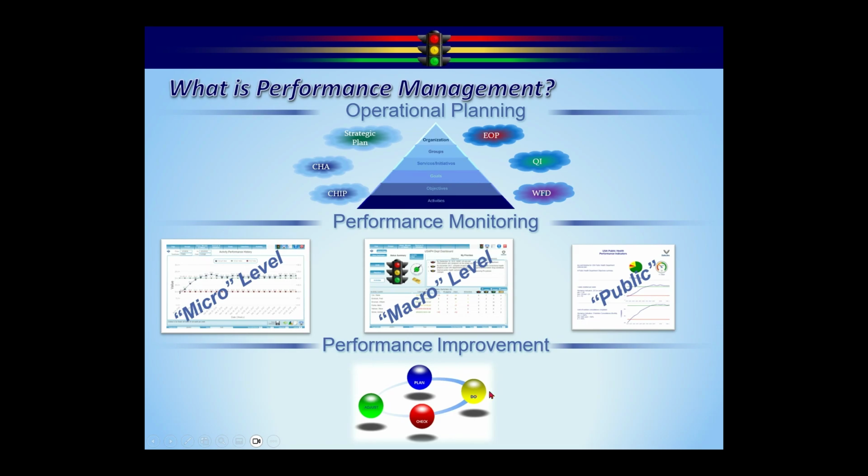If you remember, Steve Hansen was the objective lead, so he's updating that information as we go. In the check phase, once we do the comparison, we're going to decide, do we need to make any adjustments? The adjustments, again, could be to the plan itself if it's too high, or to the resources to get to the plan. So this is a continuous cycle, and it's fed by what we're going to talk about today.